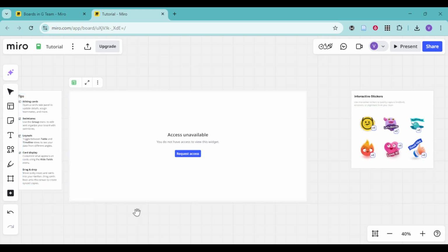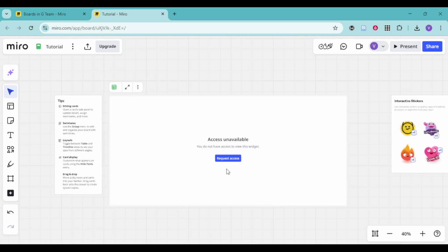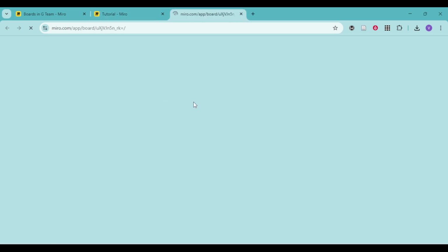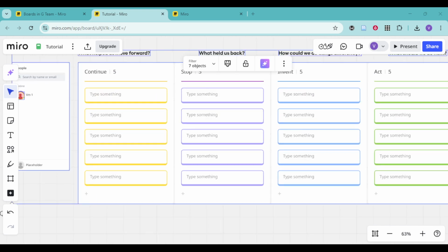Now it's time to edit and collaborate. Use the cards in the template to capture work. Give each card a short, action-oriented title, and use the description to add context, links, or acceptance criteria. If your template includes tags or color labels, use them to mark priority or category. As work progresses, drag cards from one column to the next so the board reflects reality at all times.